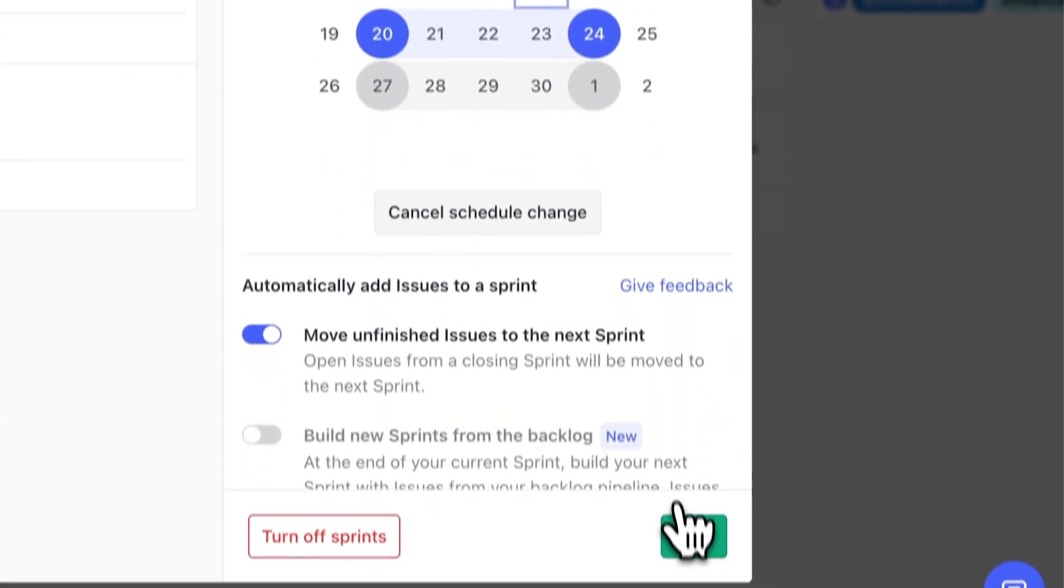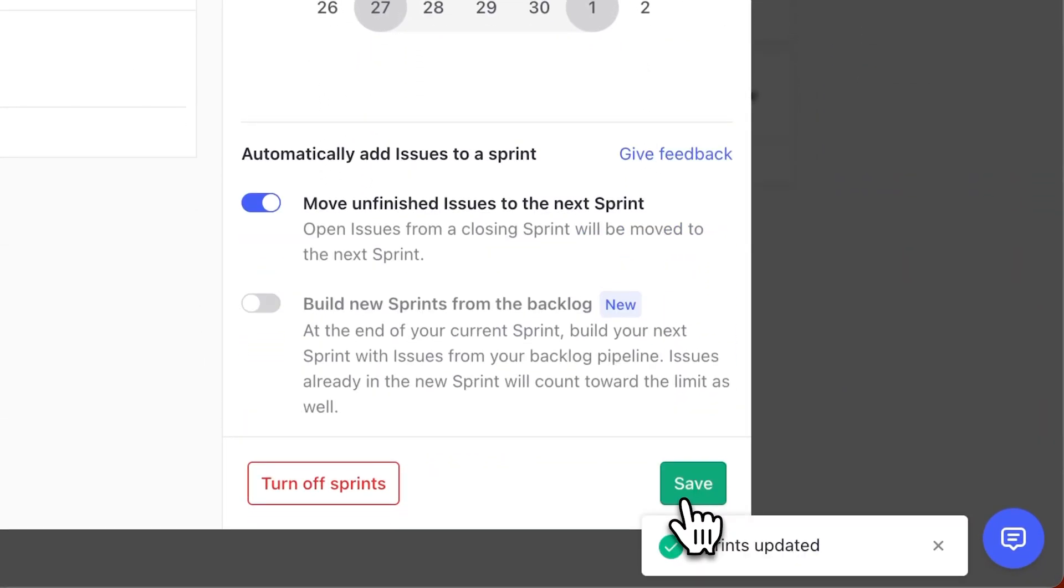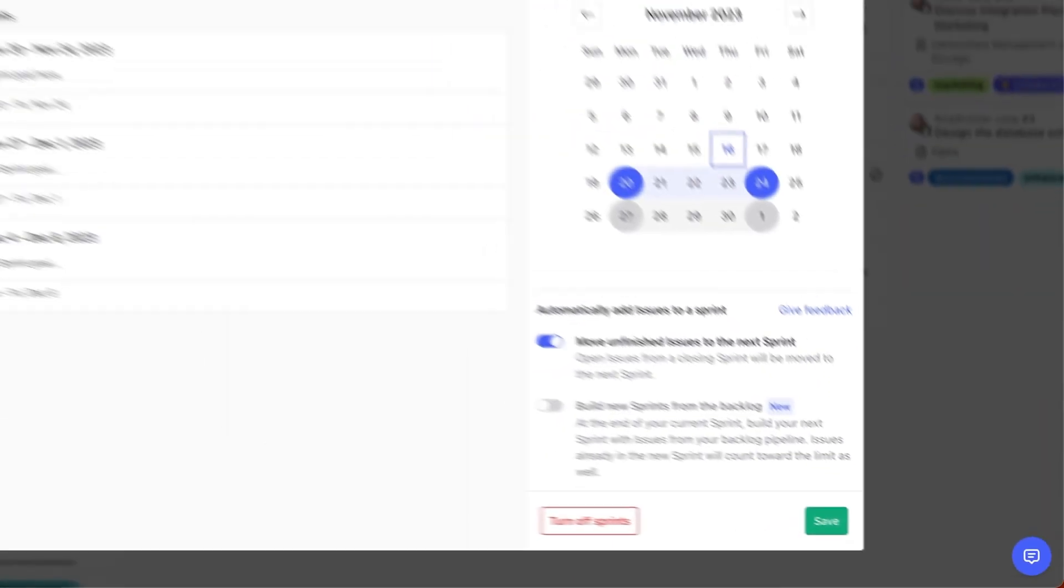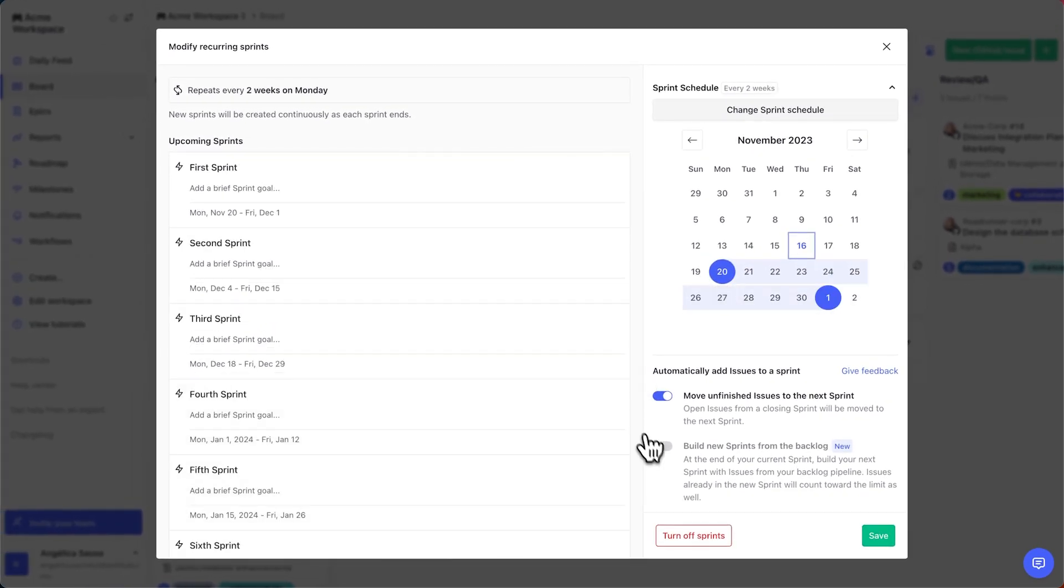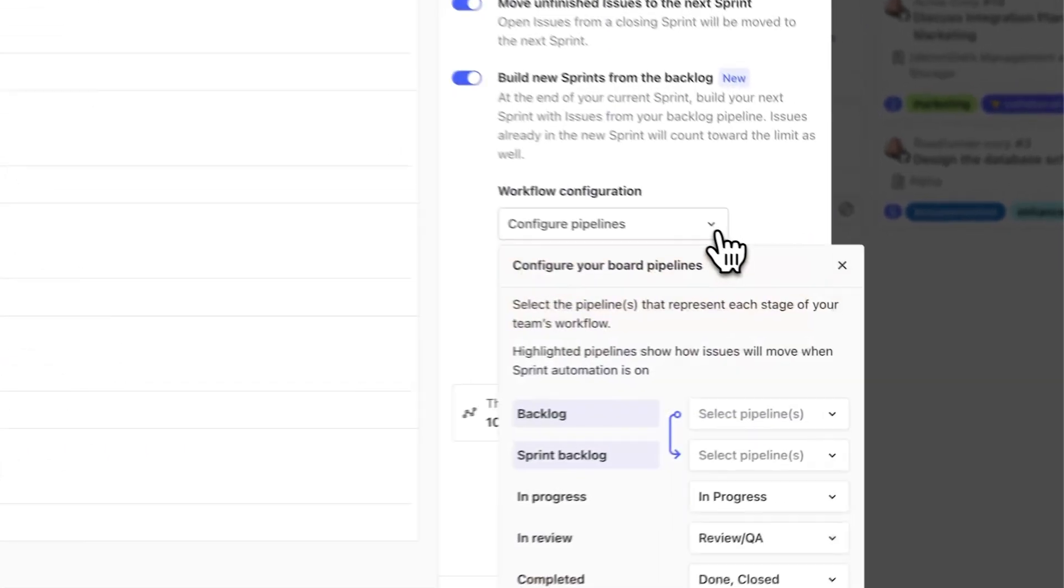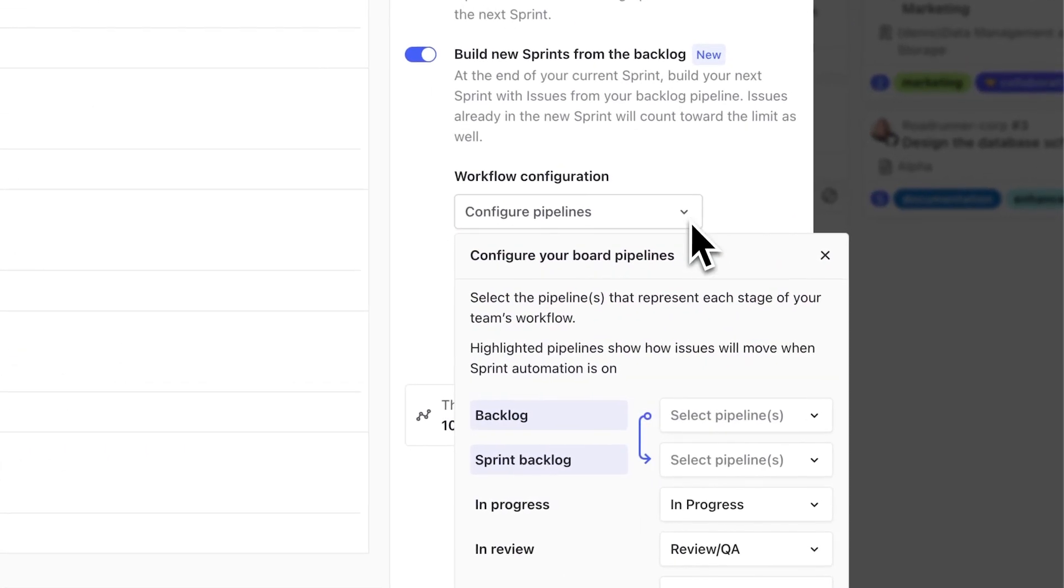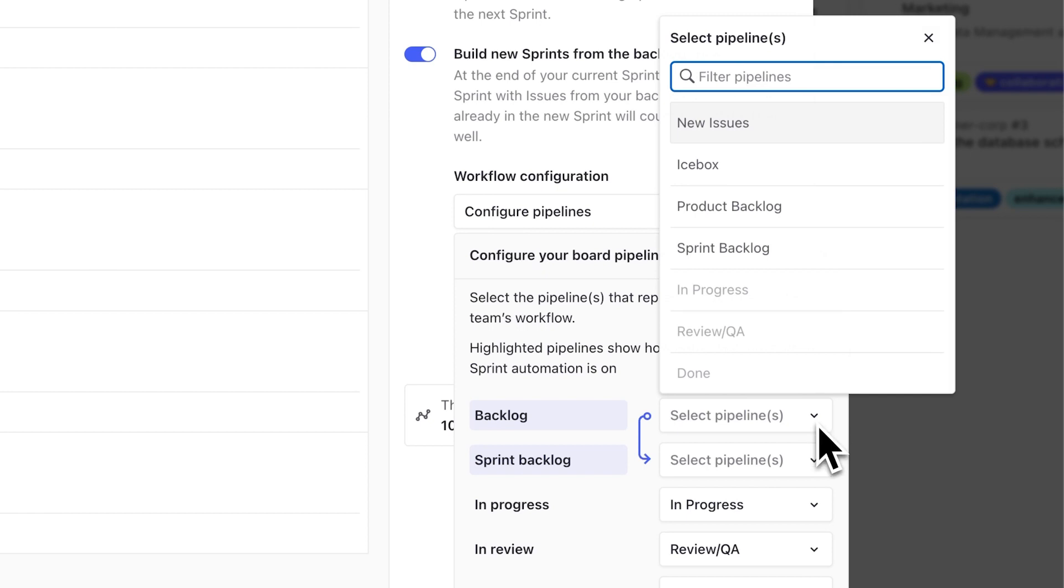Automated sprints give you the predictability of scrum while allowing you to use a lightweight Kanban approach. Next, flip the automation switches on. You'll be prompted to tell Zenhub which pipeline you use as your long-term product backlog and which one you use as your short-term backlog for your sprints.